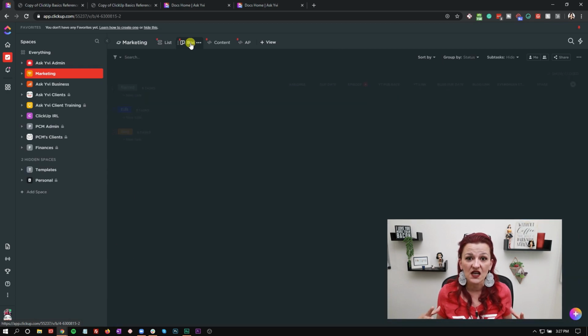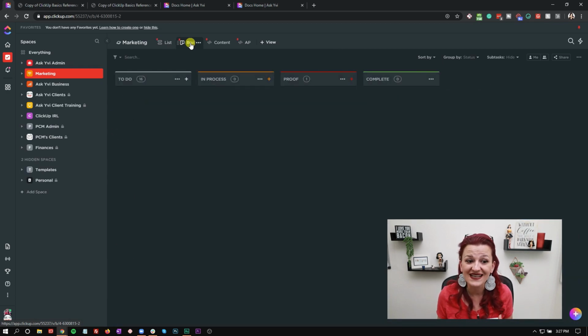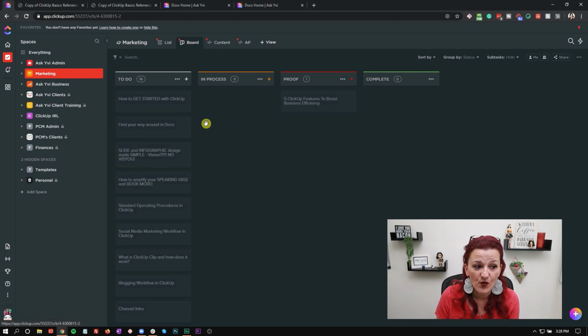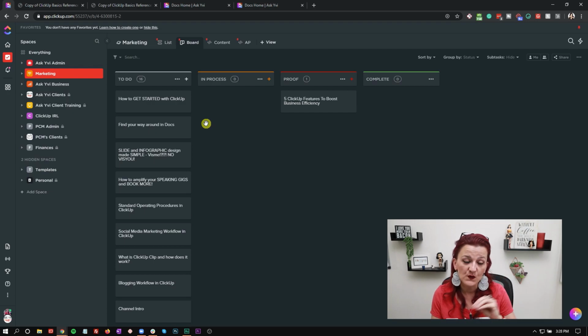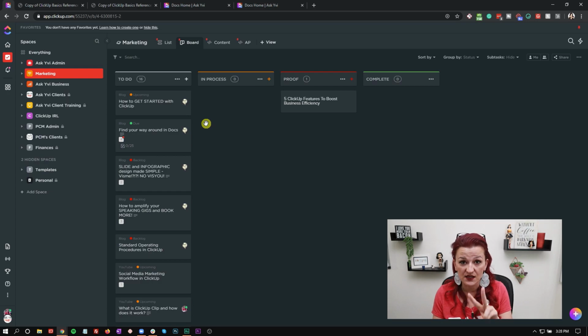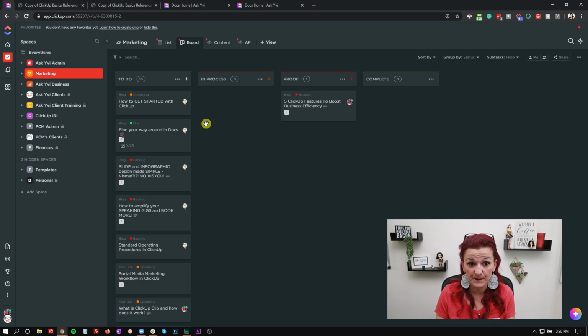You might be used to Trello. Trello is that board view. I have decided to set up my board view really simple, just with the statuses of to do, meaning we really need to do that. In process means we're working on it. Proof means the team is done with it and I need to check it, or somebody else needs to check it. And then complete when the task is done and we can move on. Pretty straightforward, just like any other project management system.